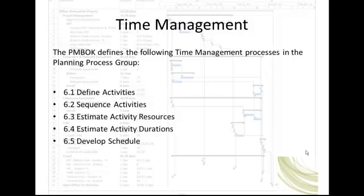The PMBOK subscribes to another approach. Before dates are assigned to an activity, the project manager defines sequences and estimates resources and durations of the activities. This approach provides the project manager with a broader perspective and more knowledge of the activities and the constraints affecting the activities.